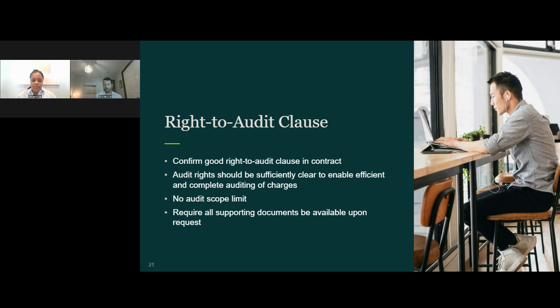They're not looking to do anything outside the contract terms, but a lot of contracts have gray areas, and having the right to audit clause plus that proactive approach on getting the documentation, identifying risk early on, supporting the team reach compliance so that when you get to the end of the project, you're not worried about, for example, major audit findings. You're more focused on transitioning the project from construction to operations. So I think your main takeaway here for projects that are larger, really consider utilizing the guarantee maximum price contract with the right to audit clause, and then making sure your cost of work definitions are defined, clarified, and engaging legal and accounting firms to make sure that it's in line with best practices.